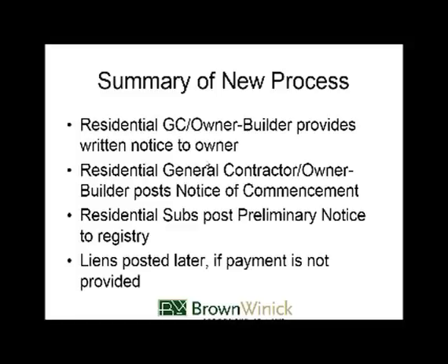The next question is, what happens when a sub makes a one-time repair, like a plumber or an electrician? Is it unrealistic for them to file a notice or provide notice every time they go to a job? Is there an exception for that type of service provider? There's no exceptions for subs based on the work they do or material suppliers based on the work they do. If they're going to be doing a significant amount of work, I would advise them to protect themselves and follow the rules that are required under Chapter 572.